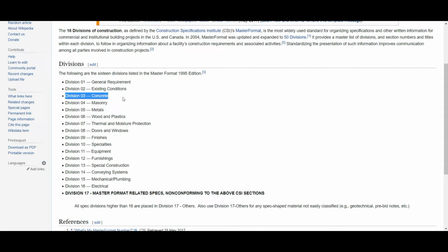So if it's linear foot or area or square foot, things that would be under concrete would be like foundation, anything that's made out of concrete. Some people want to have concrete floors. Some people like to have basements made, or a safe zone for tornadoes, or even a safe for your valuables. So they'll go through the floor plan and calculate all the quantities of concrete.